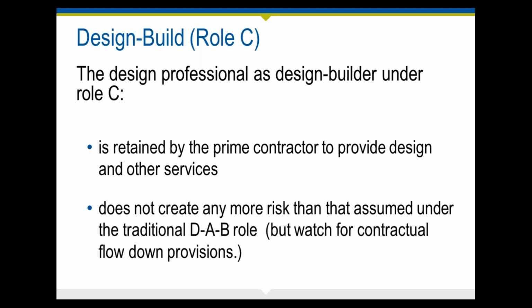The one thing that is different is that in this role, you're not acting as a representative of the client. Because of the direct contractual relationship with the contractor, certain services traditionally performed by the design firm during the construction phase, like review of payment requests and the quality of the work, may be eliminated from your scope of services.